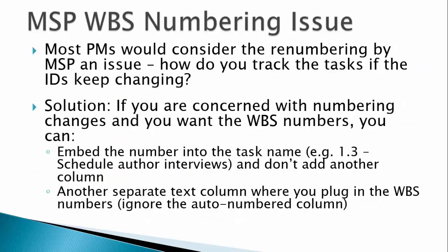Most professional project managers would consider the WBS renumbering an issue. You don't want your reference to a task to keep changing. There are two possible solutions that are easy to implement. First would be to use your WBS numbers and embed them in the task name.